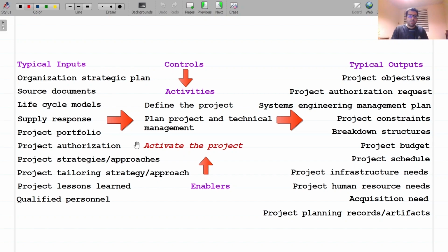If a project management plan or PMP already exists or is in preparation in accordance with practices as defined by the Project Management Body of Knowledge or PMBOK, from the Project Management Institute, which is PMI, for example, then it is important to coordinate in order to have a global consistency between these artifacts. The SEMP should reference or provide a link to the PMP for direction on how the SEMP will be updated and controlled on the projects.